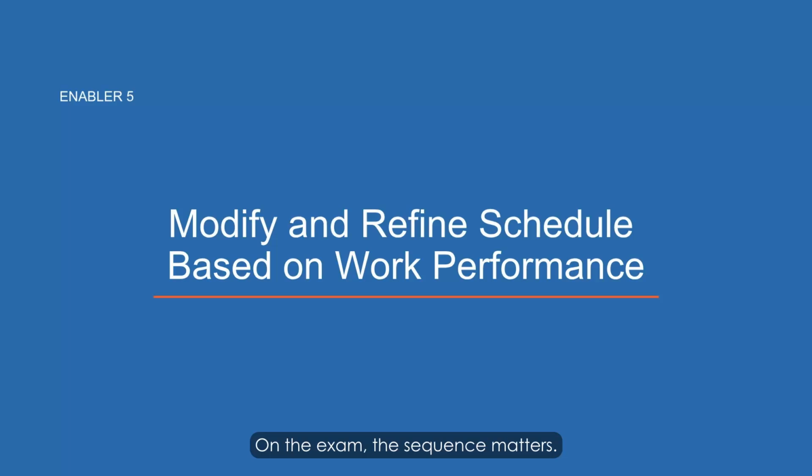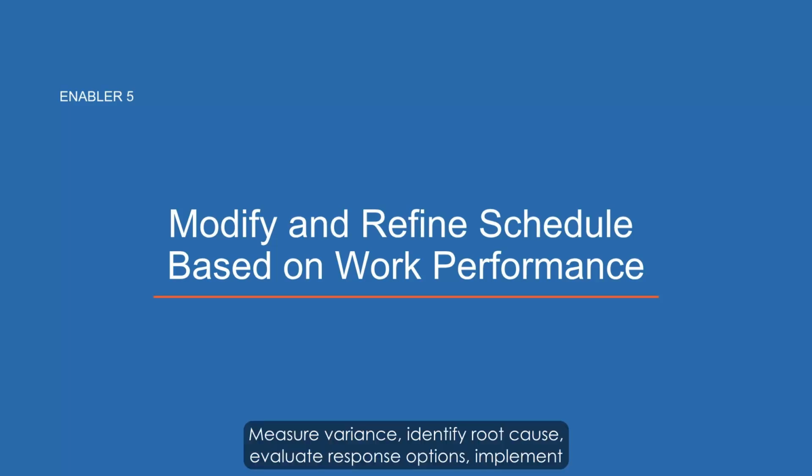On the exam, the sequence matters. Measure variance, identify root cause, evaluate response options, implement the least disruptive response, update documents through change control.